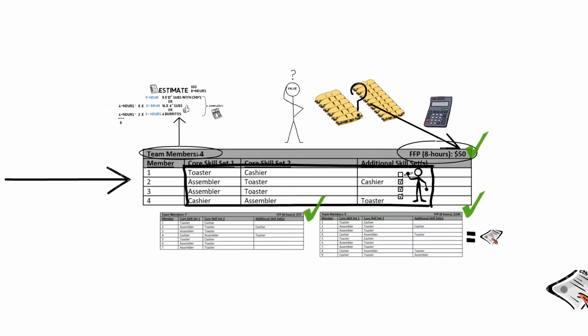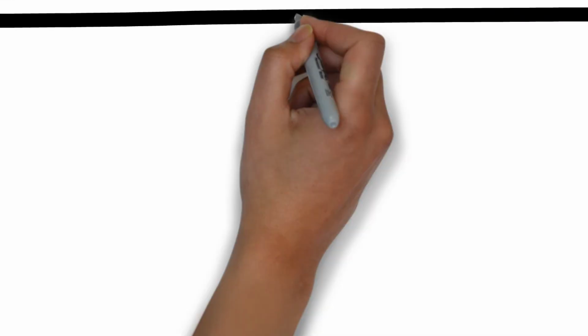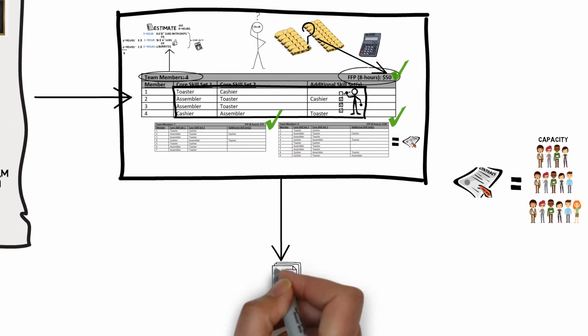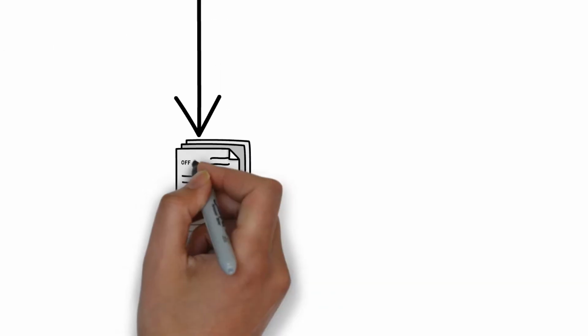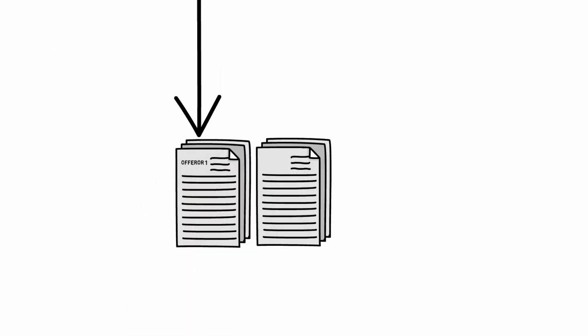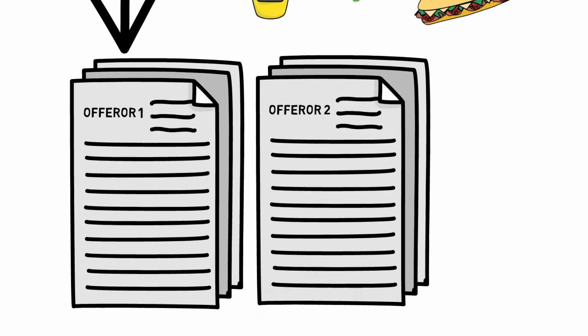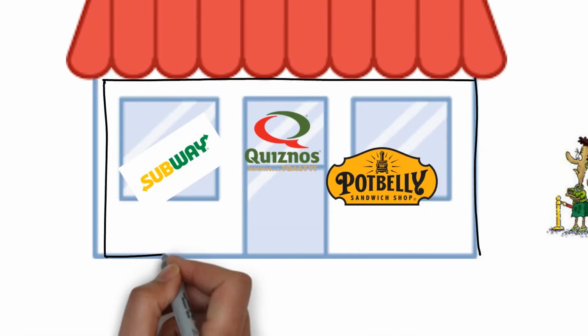We would need similar information for all of the proposed teams from each offeror. This provides us an estimate of the value we can expect to receive post-contract award for each team at a fixed cost. Knowing the fixed time, cost, and value of each team allows us to make a best value determination during source selection. Now that we have made the best value determination, how would we monitor the contract?